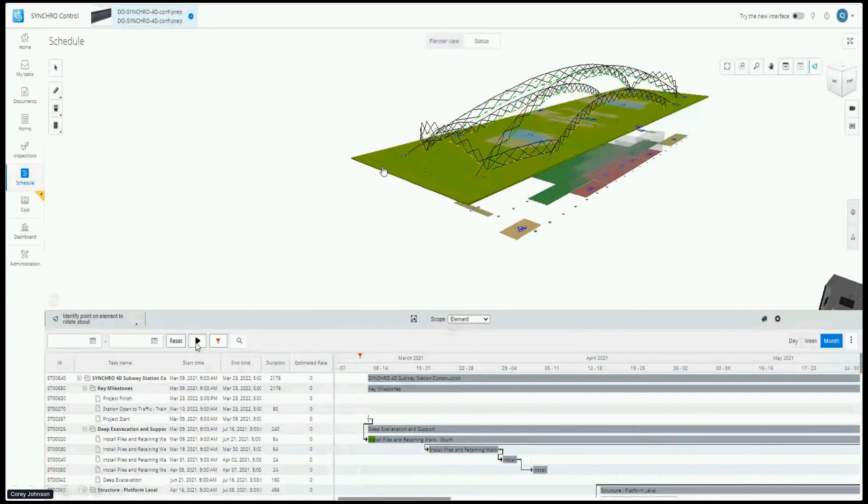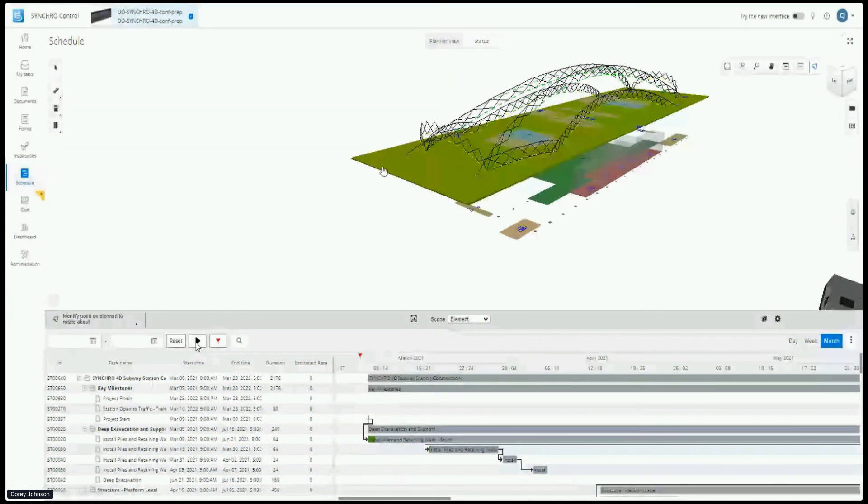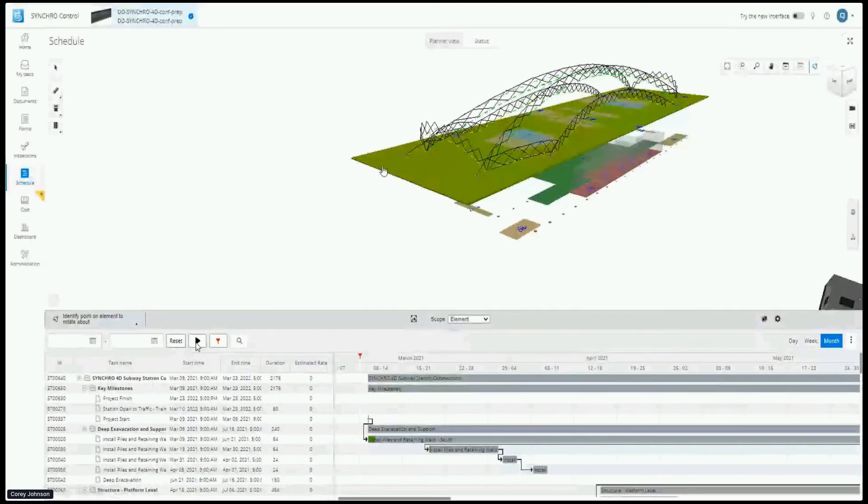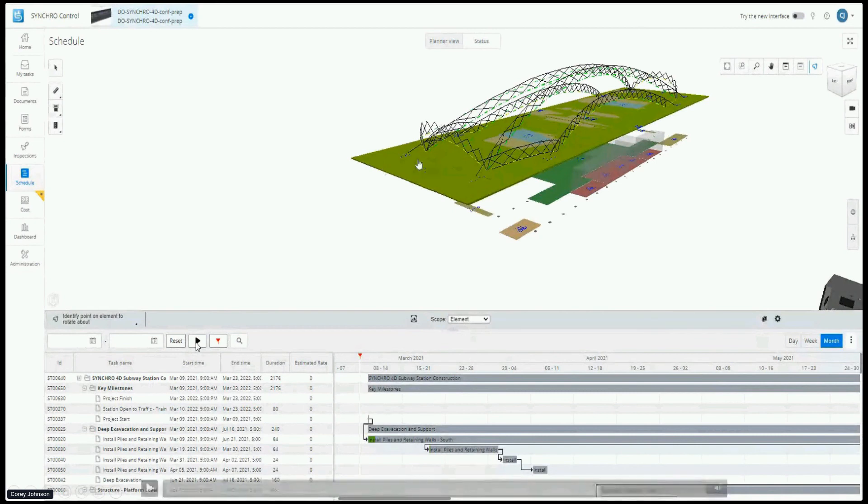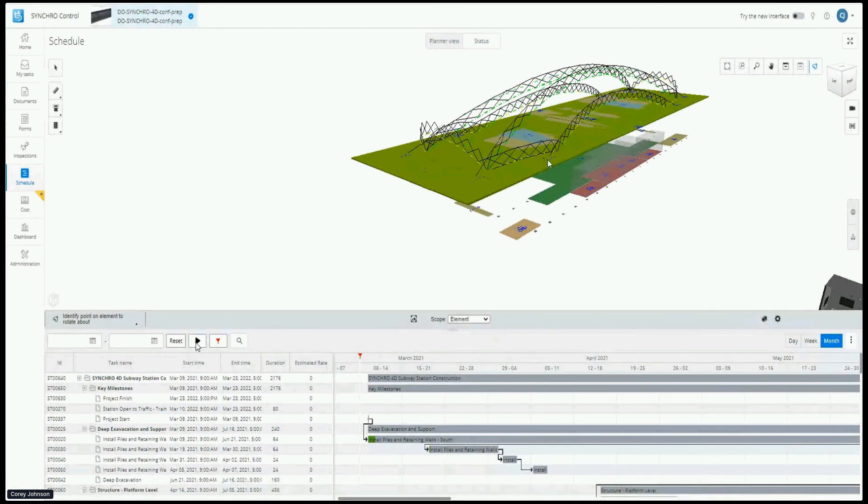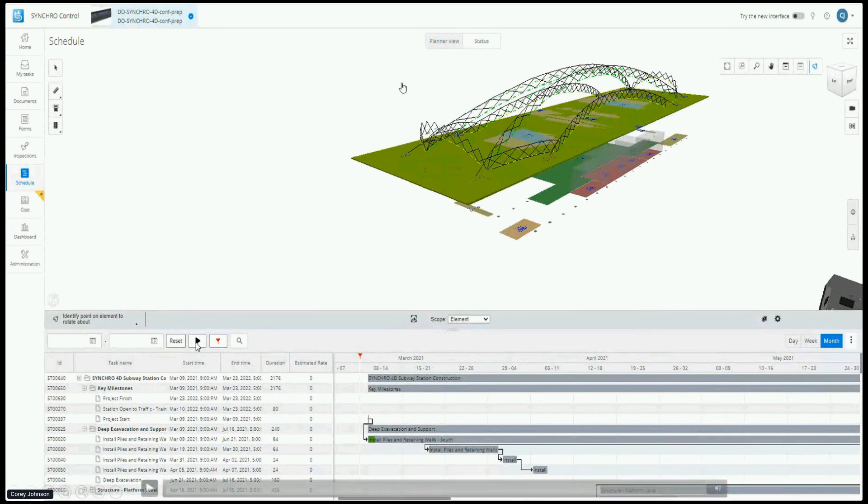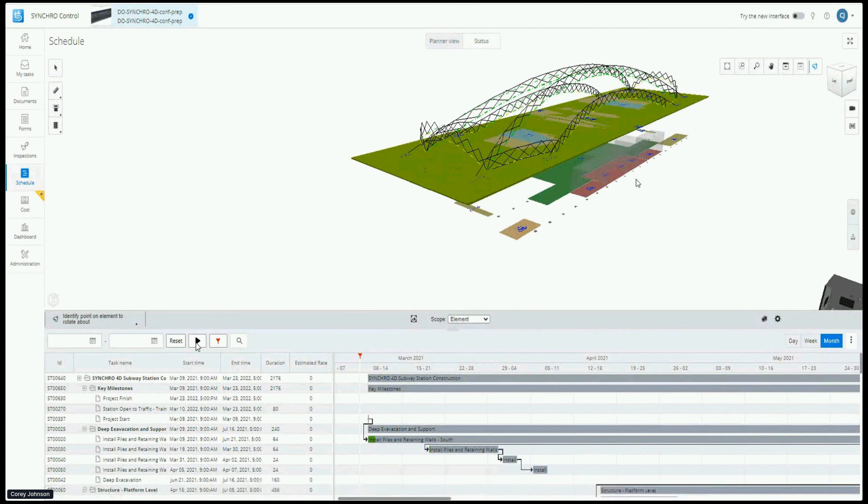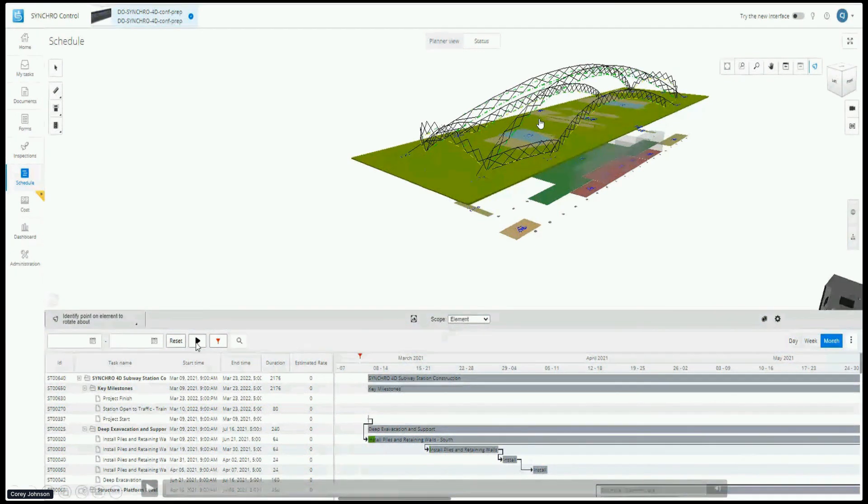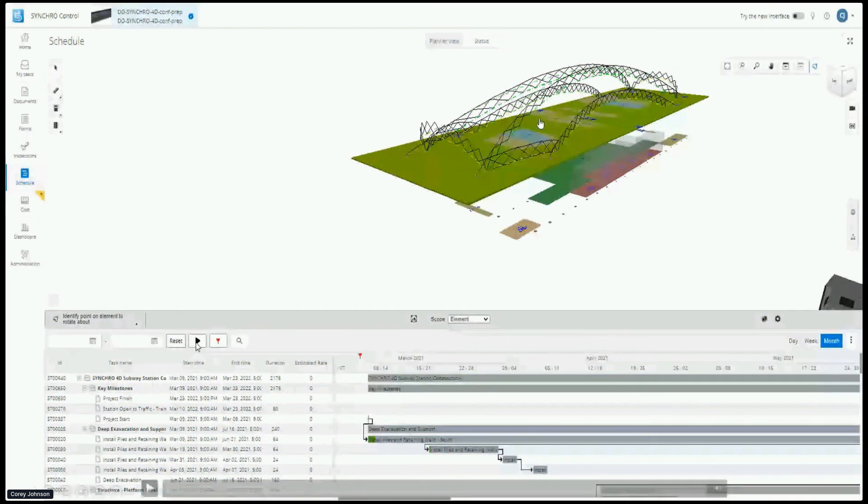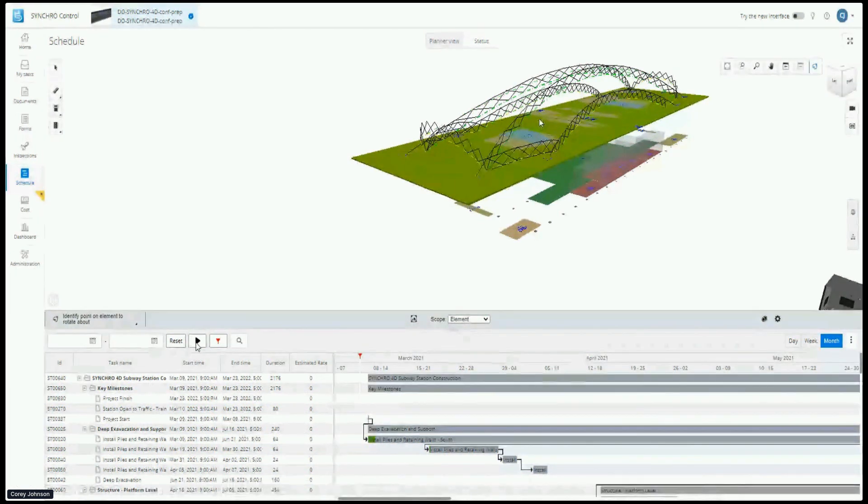Do we handle DTMs, digital terrain models, when they bring them into our federated model? Yes we do. We also handle point clouds, reality meshes as well. You could actually do a visual and show a drone capture of what's my status on June 1st, 2021, and I could actually run this to June 1st, 2021 and visibly see - this is what the drone captured and this is what's actually done.